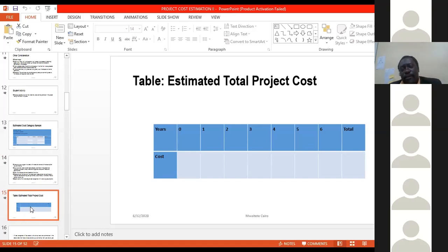Most projects must have year 0. Year 0 is very significant in planning the project, because during year 0, actual production has not yet started. Output has not yet started. Benefits have not yet started coming in. You're planning for some costs that you think are very strategic to appear in year 0.